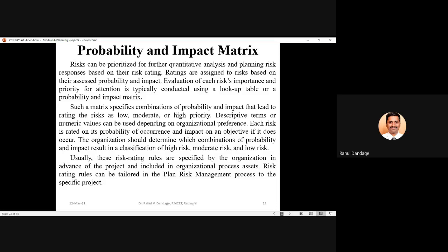Normally, when a risk is evaluated, we take the product of probability and impact. If both are high, the product will be very large. If one goes to the very low side, the overall product will be reduced, and the overall effect of the risk category will be reduced. So based upon this, we should have that probability versus impact.